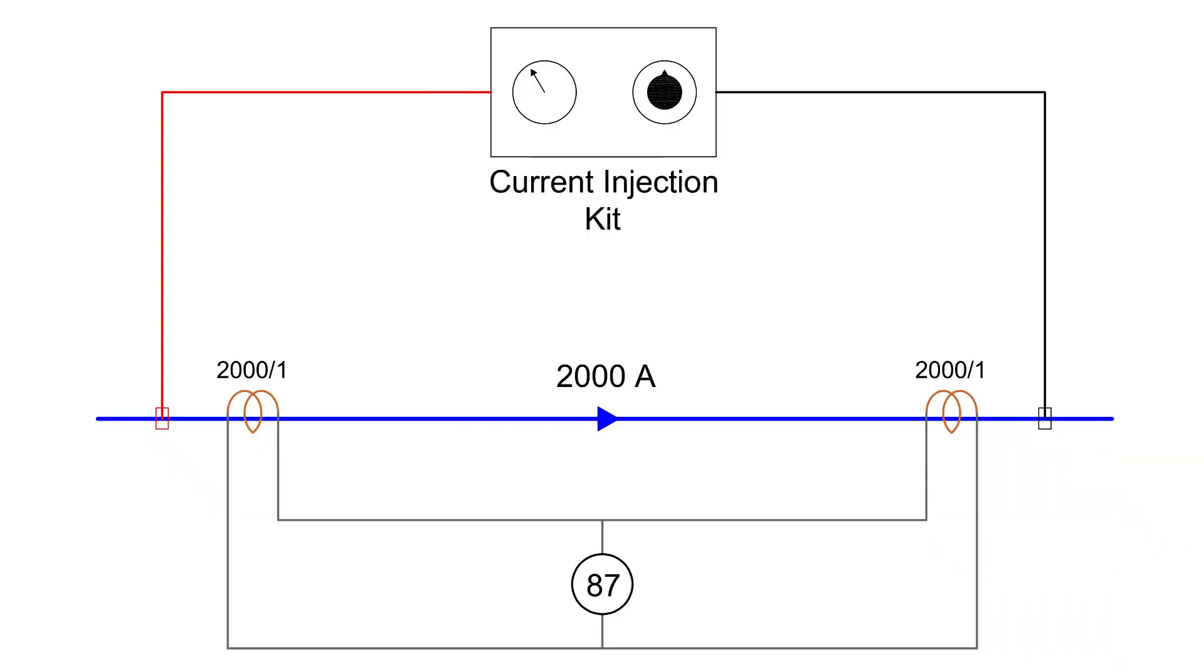For example, if a circuit is rated at 2000 amps, then 2000 amps of current must be injected into the circuit to ensure the overall healthiness of the equipment and the proper functioning of the protection scheme.